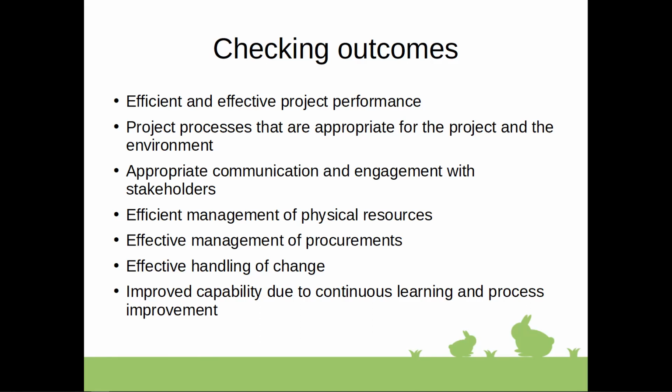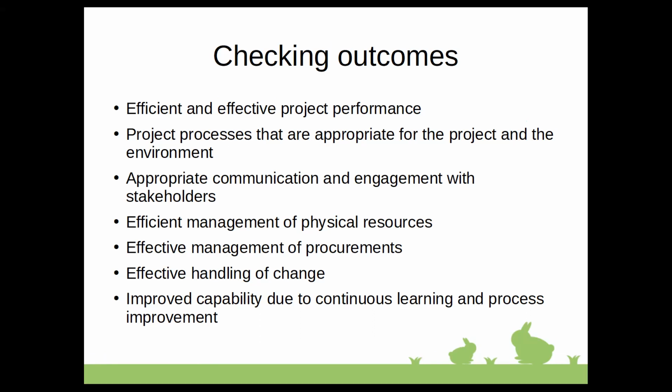For the adaptive projects, approach would be to have a backlog that shows rate of accomplishing scope and the rate of adding new scope. Basically, whenever backlog is decreasing, it's a good sign that project is going well in terms of adaptive projects.